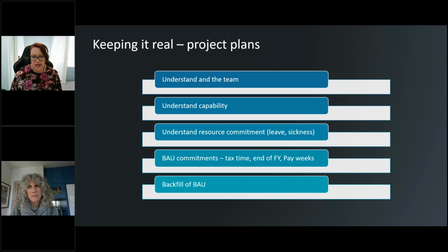Obviously, sickness is a little harder to plan for, but any planned leave, build it into your project plan right up front, and know what that looks like. Also understand the BAU, or business as usual, commitments that your payroll or your people have. We've got things like tax time, end of financial year, and pay weeks. If you want to get your finance person involved, don't book them for the end of the month because they're already going to be busy. So look at those business as usual commitments and really work through that.